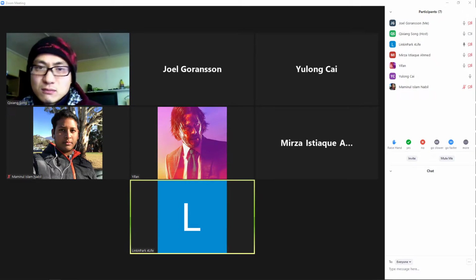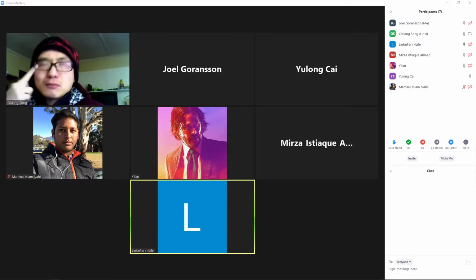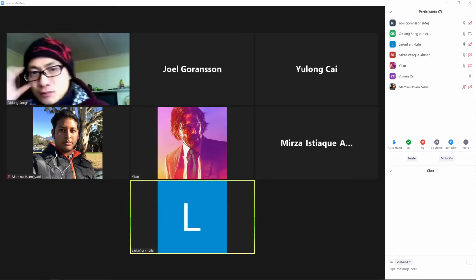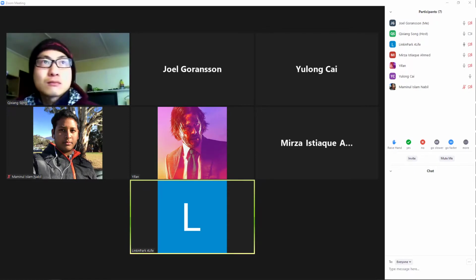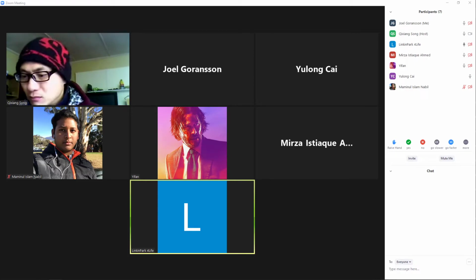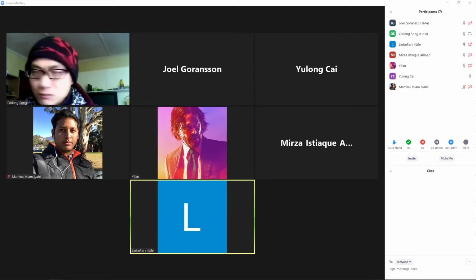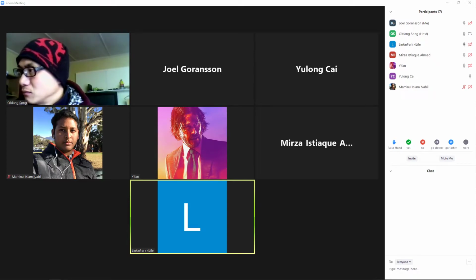Therefore, we had a plan to negotiate with the client about this matter, stating that we would only deliver the front end. We thought that by doing this, we would focus entirely on the front end, allowing him to have a fully functional front end, ready to plug in with the backend. However, Nikhil's delivery at the very last minute has allowed us to carry on with the old project. We are on the way to ensuring the minimum viable product first, in accordance with the old project description in semester 1. And we plan on having fewer nice-to-have functions in comparison to the plans in the last cycles.